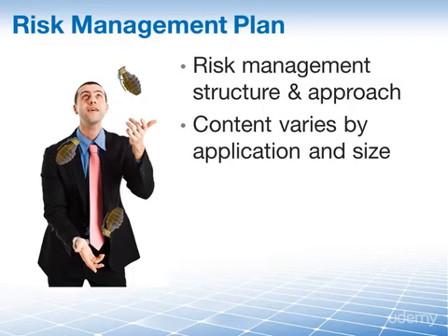The risk management plan, again, is different from your risk register. The risk register contains, or will contain, long time in the future of our project here, the list of project risks, the result of risk analysis, as well as the risk responses.